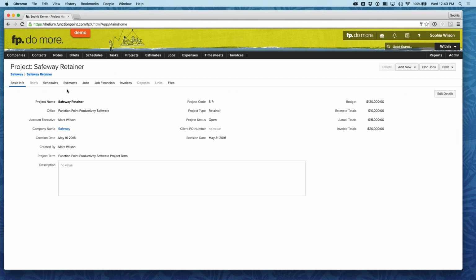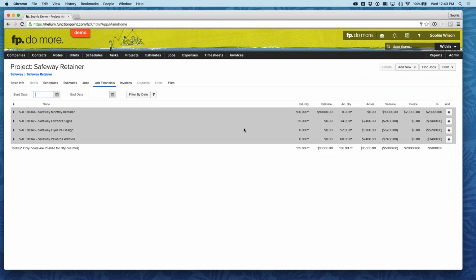This is a good way to have the hours estimated for all of your working jobs, but not have it affect the estimated value of the total project. You're also not affecting the billable value of the timesheets that get tracked. When the time gets tracked, they're still going to have a value. You haven't adjusted anything there. You're just overriding each of those individual jobs to have an estimated value of 0, so that the estimated value equals the amount that you intend to bill each month.